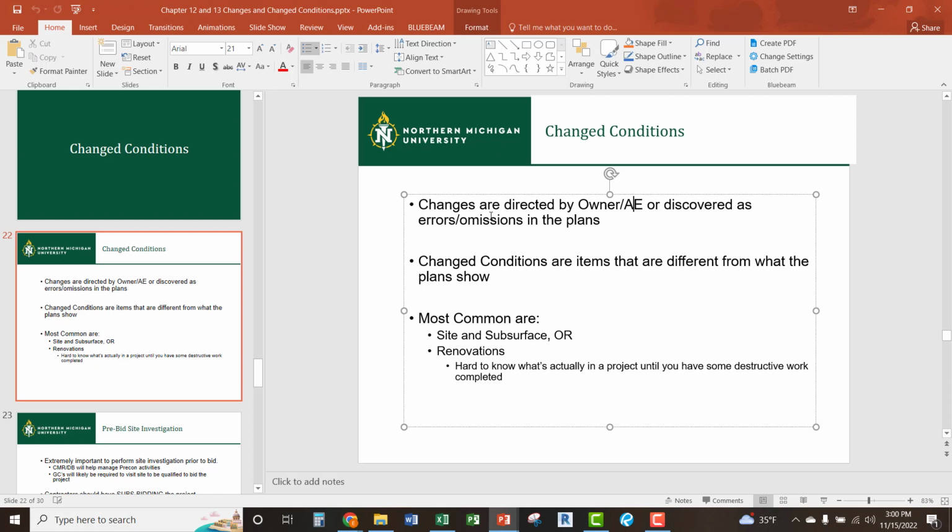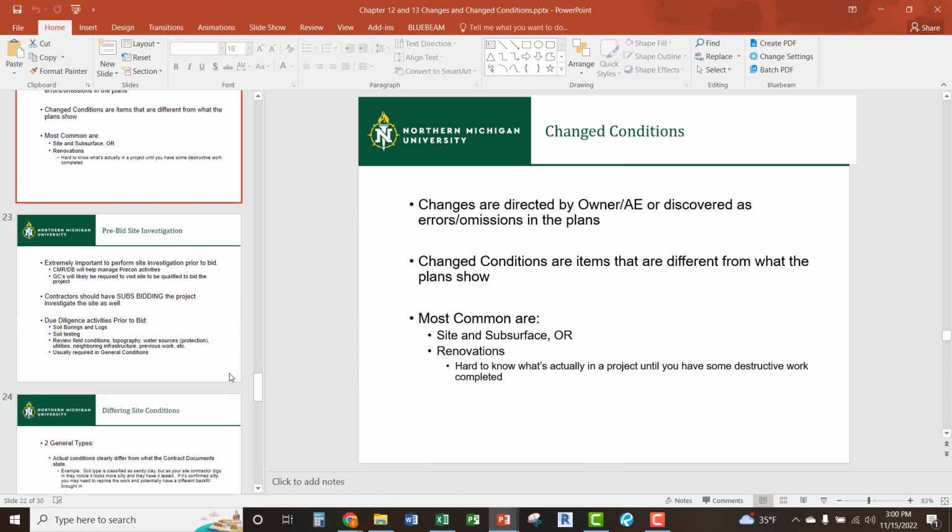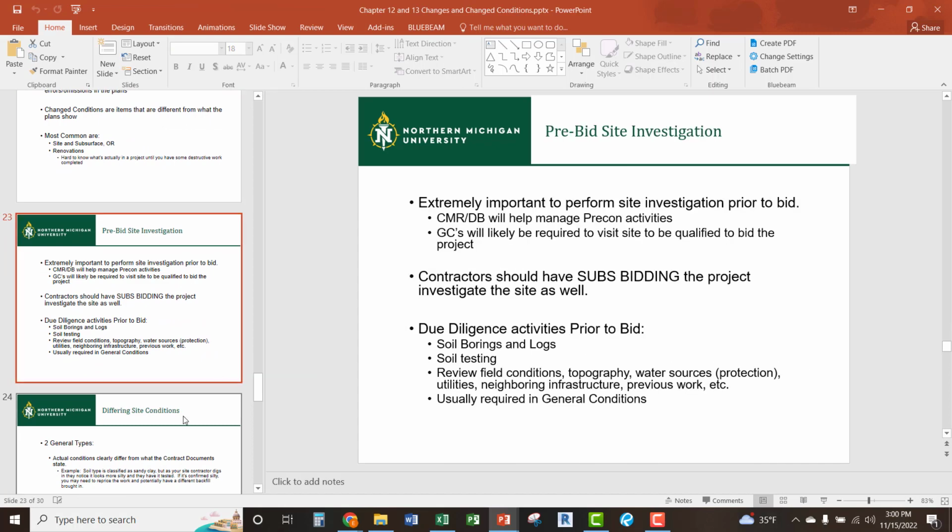But at the same time, I'm protected as the contractor to say, yes, I know you want to spend down your money, and that's fine. We have it all available, and we don't have to go through the whole change order process. That's okay. But I'm not going to be held liable if I run into something during this renovation that we were not expecting, and I have to now pay for it out of that. Or if I have scope gaps or something like that where I now have to pay for it out of my contingency.